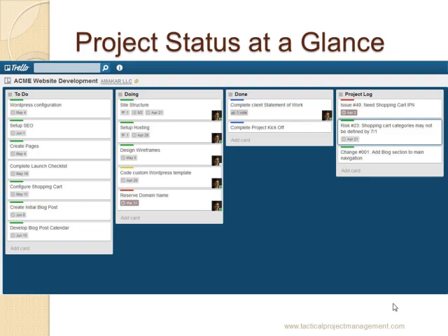What you also see is the typical traffic light status colors of green, indicating that it's on target, yellow, indicating that there's some risk, and red, indicating that there is a delay in that particular date. I'm using done, the blue color, to represent which task is actually completed, so we no longer have to focus on those specific tasks.